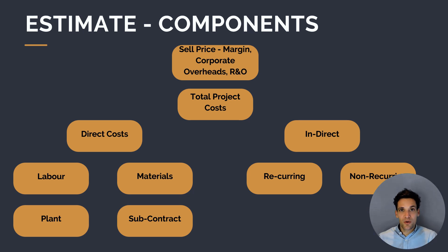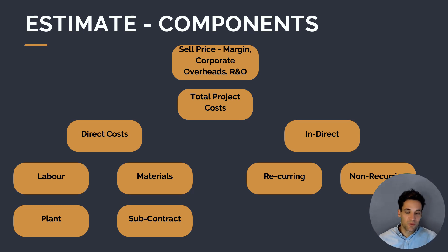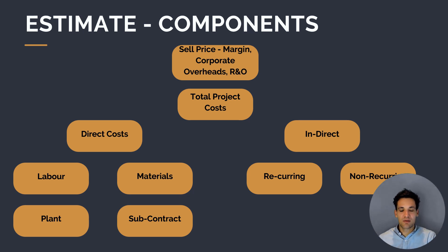For example, if we need to pour a concrete foundation, we've got the costs of the laborers needed to do it, the costs of the concrete pump and other equipment, the cost of materials such as the concrete, the reinforcement, and the formwork, and then any subcontract costs — for example, if we're using a crane to lift equipment into position, we'll have subcontract costs associated with that.